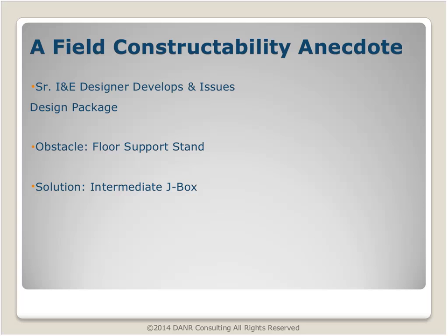And so we ended up having to talk to the client and put in an intermediate J-box, and that's certainly not an ideal design. The point of this anecdote is that different team members bring unique perspectives, and it's the collective team that builds the best design. If my designer had appreciated that, he would have sought out the construction manager for input, and we could have avoided these complications, because the construction manager is looking at it from a different perspective than the designer. Everybody brings value to the team, and that's one of the reasons that communication and collaboration are so